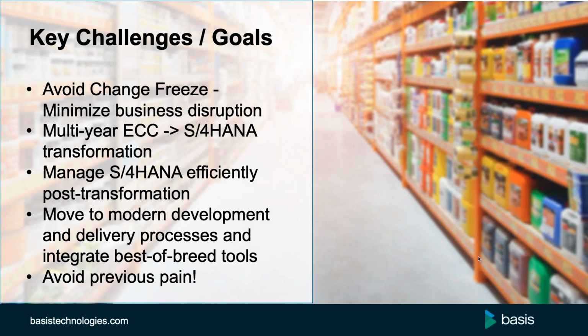So during the migration to ECC, if we cast our minds back to the mid 2000s, they had the same complex one-to-many 4.5 landscape at the time, and without sufficiently robust processes around dual maintenance, meant that they had to restart their ECC journey project 3 times in total until they had a process in place that was really fully governing and fully managing the dual maintenance, so that they were in control and would not find that when they migrate to ECC that there were missing changes to programs or missing configuration.